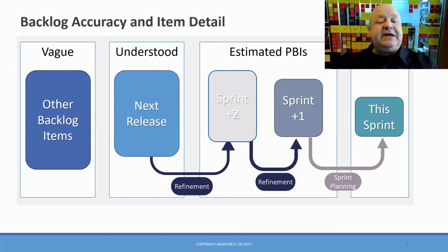Right? And what's in that top 10%, there's no guarantee it's going to become part of that next sprint, because it might not satisfy what's classed as being the sprint goal to deliver the business functionality that the product owner wants to get out of that sprint cycle. But that's how we would plan to raise something up.